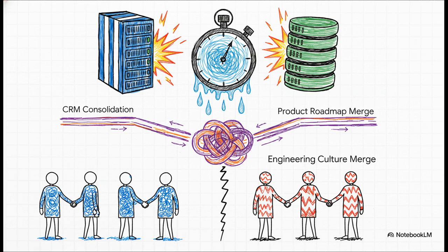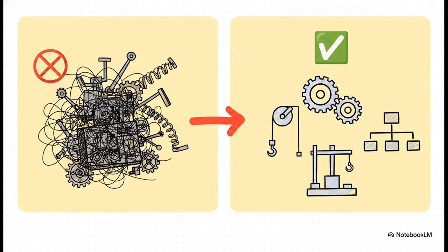Take a quick second and mentally challenge yourself. If you had to categorize these 3 work streams using the domains we just talked about, where would you put them? Now, the traditional, outdated instinct is to treat this entire acquisition as a monolithic, complicated project. You know the drill. You assign leads, you build one giant 9-month integrated Gantt chart, and you report to a steering committee. But applying Cynefin reveals the real climax of this scenario. This entire thing is actually a confused domain situation. Treating it as a single complicated project is a massive mistake. To succeed, we absolutely must decompose it into 3 separate subprojects that live in totally different domains.